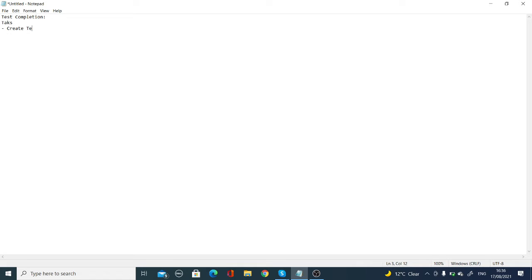Create test summary report. So when you complete testing, you need to generate a report indicating each and every test activity you have done during the project. Closing defect report. So you have generated defect reports, you need to close them, so you can hand over to the maintenance team.